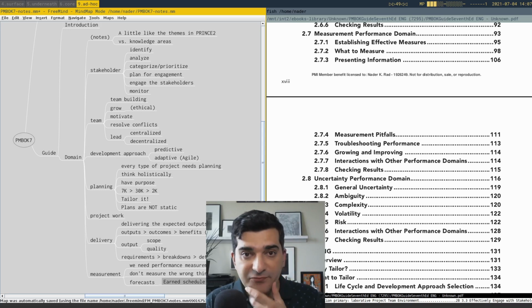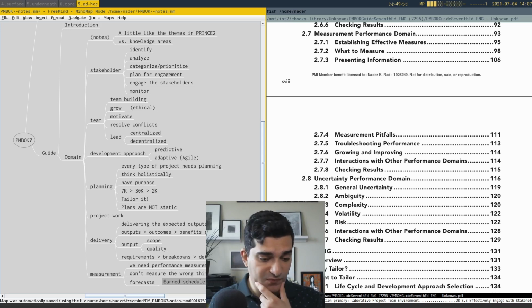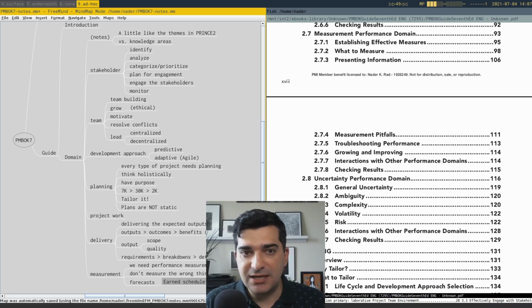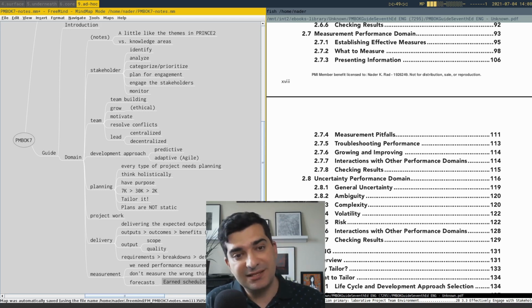All right, so be careful about that. In adaptive projects, make sure you're not only focused on velocity or things like that, or something that is very common, unfortunately. People keep comparing the amount of user stories that they finished in a certain iteration to the whole number of user stories they had for that iteration. That's the wrong measurement.